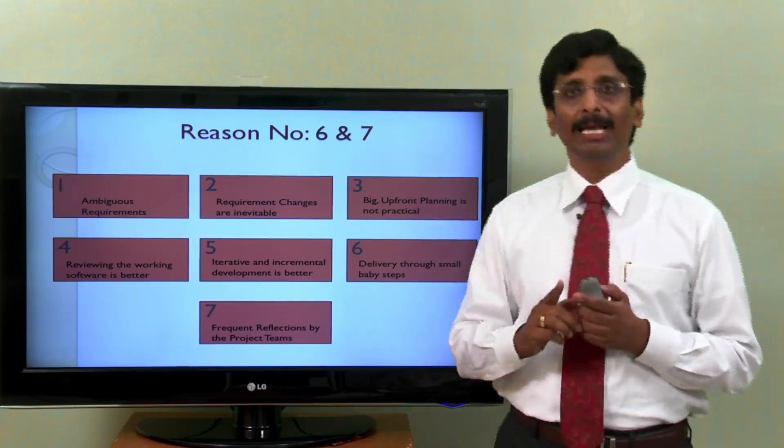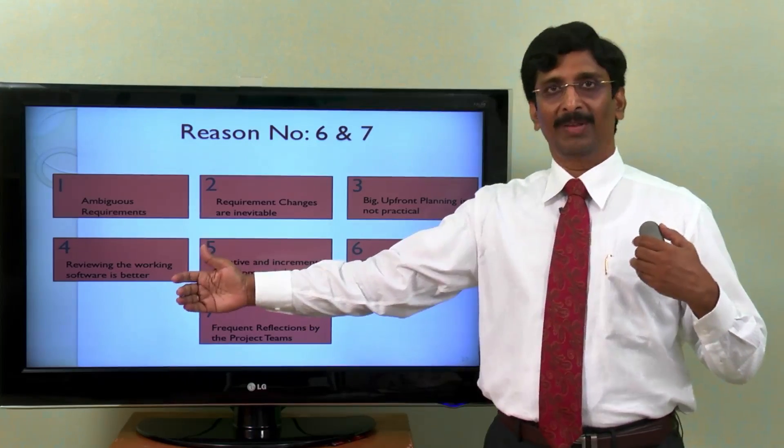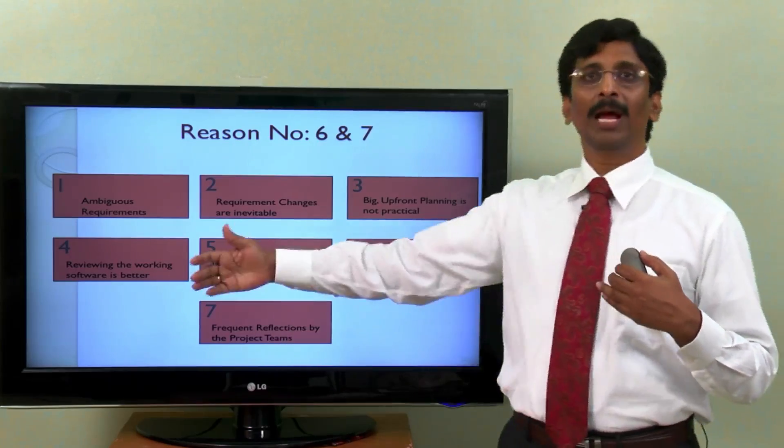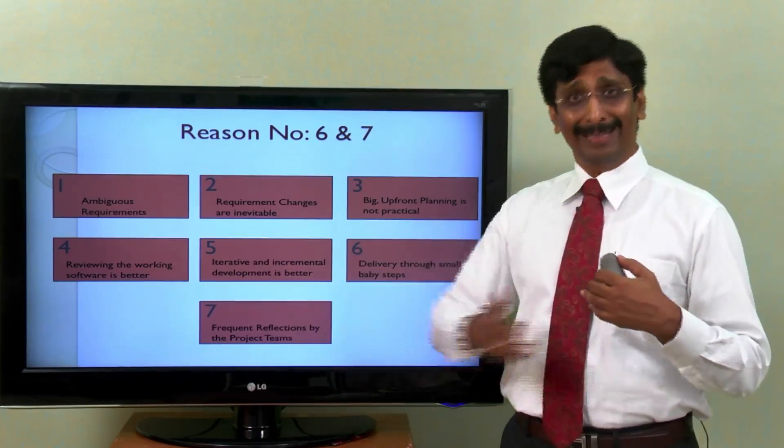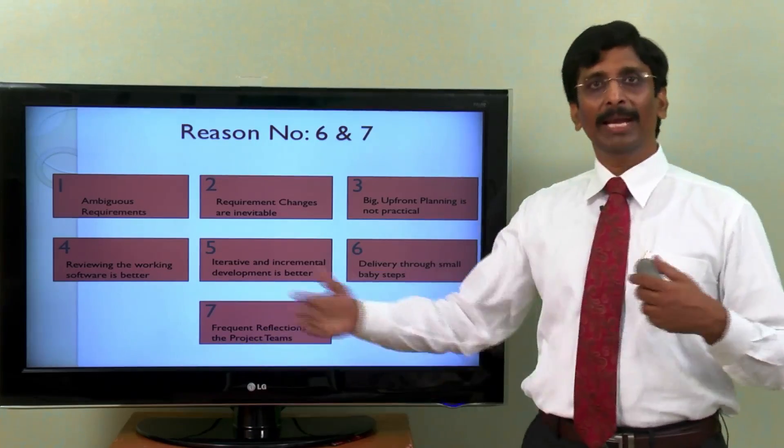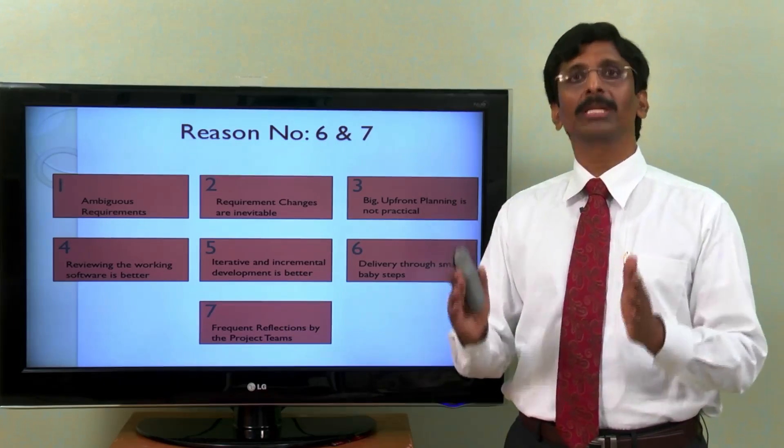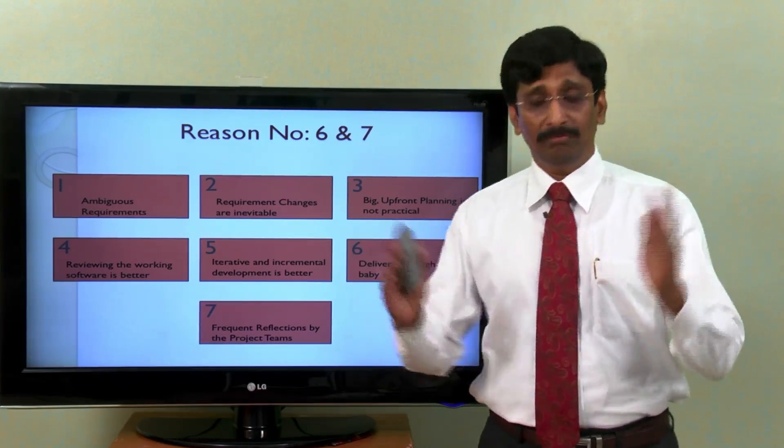And big upfront planning is not done in Agile. Planning does happen in Agile, but it happens over a period of time. There is a release planning. There is an iteration planning. There is a daily planning. Various planning happens. But in Agile, we do just in time planning.